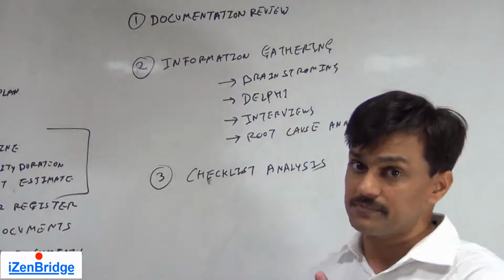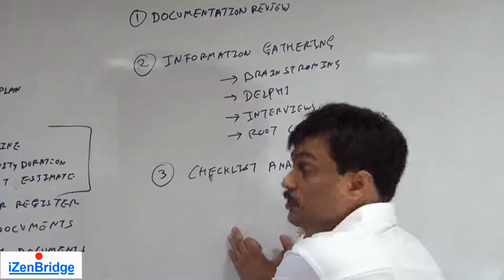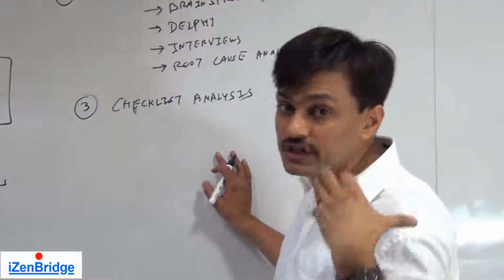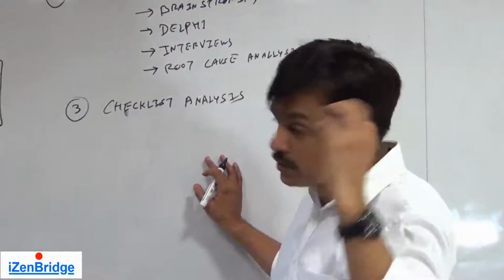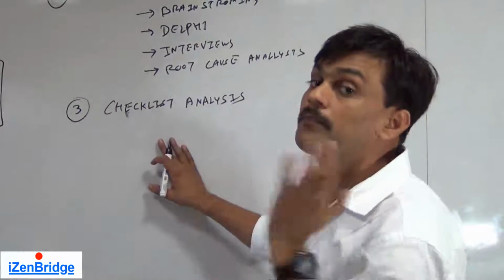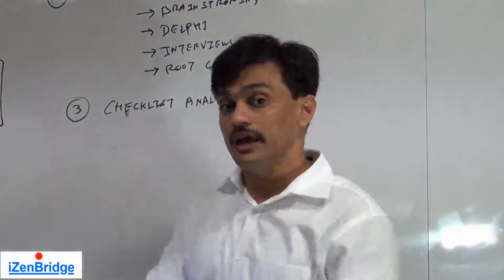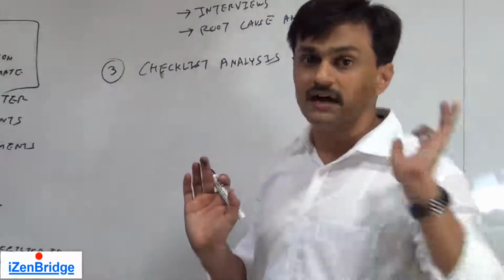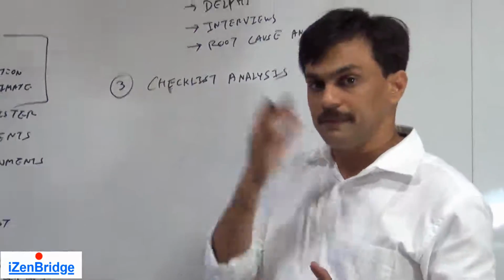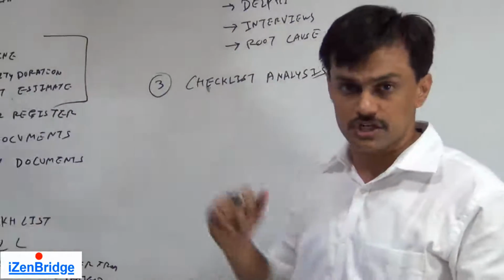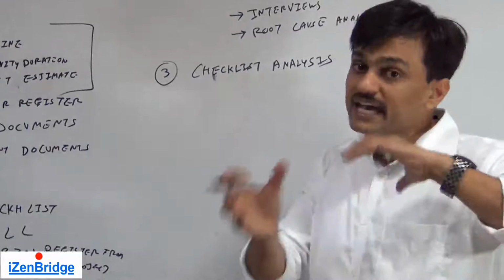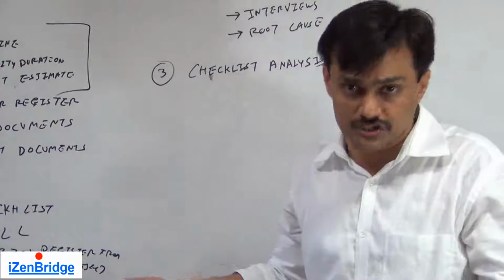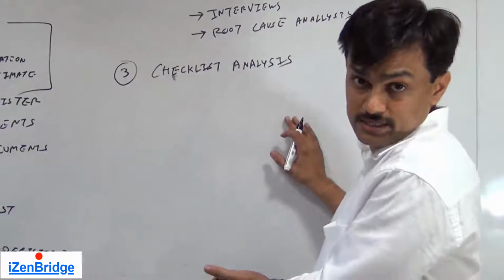But as project team members, you should not only rely on checklists but also put in your own mind. As I said in my previous discussion, project-specific risks require your own judgment, because the checklist may not be able to give you a project-specific risk. It can give you a risk like, if you have part-time resources, look for these risks, because they keep occurring, like communication breakdown, people taking off without informing, etc. If you are dealing in multiple currencies, you may have an exchange rate fluctuation risk. So all those things can come from checklist analysis.